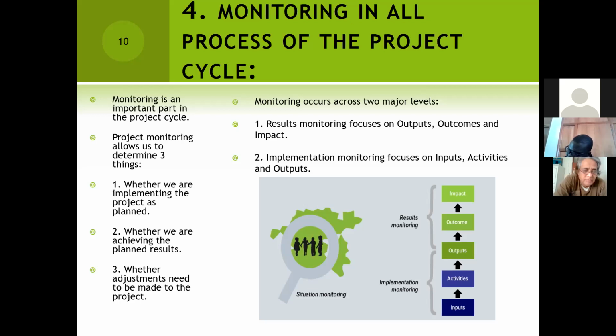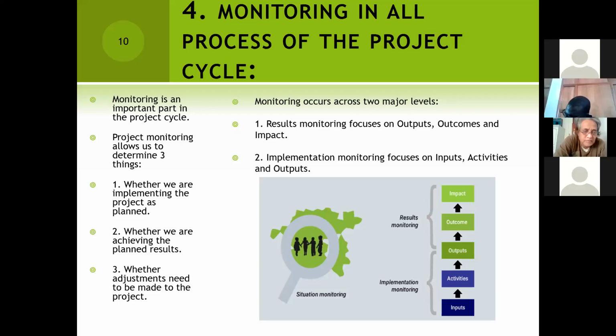So either we are doing results monitoring, or implementation monitoring, or we are doing what we call situation monitoring, which is contextual monitoring, just looking at what is happening, not just in the project, but also around the project. That's why we talk about those three types of monitoring that we need to be able to do.